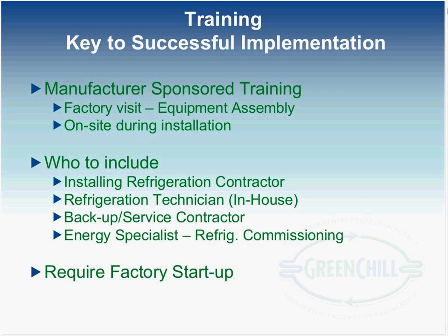And with all of our installations to date, we have mandated a factory startup. Again, I think that's part of the training. In case of a major power outage, a technician or backup contractor is going to have to start up this system more than one time, and we need the experience on hand to understand and go through the factory startup.